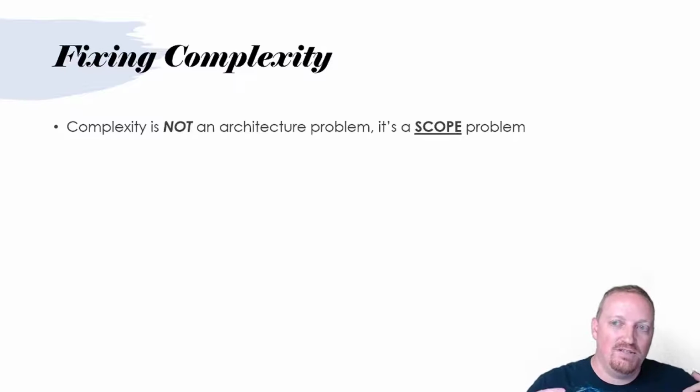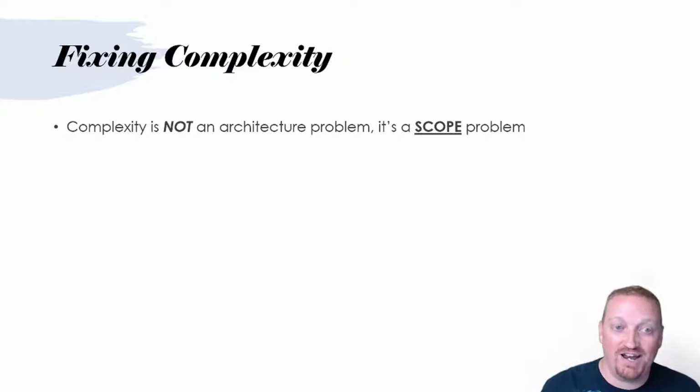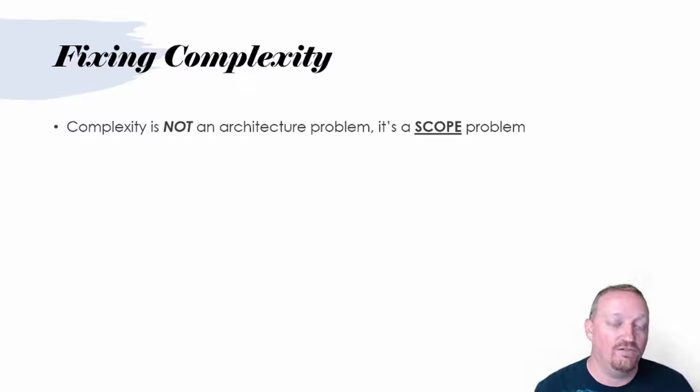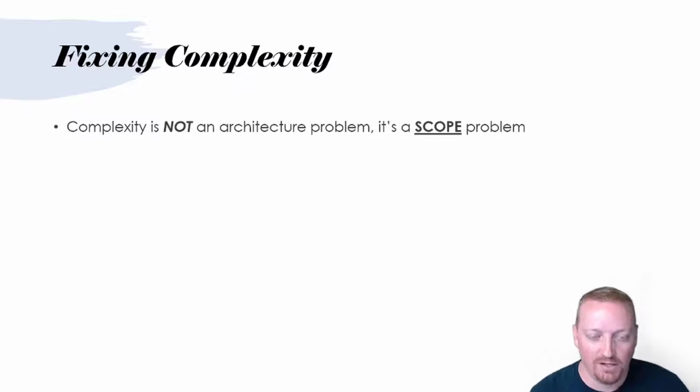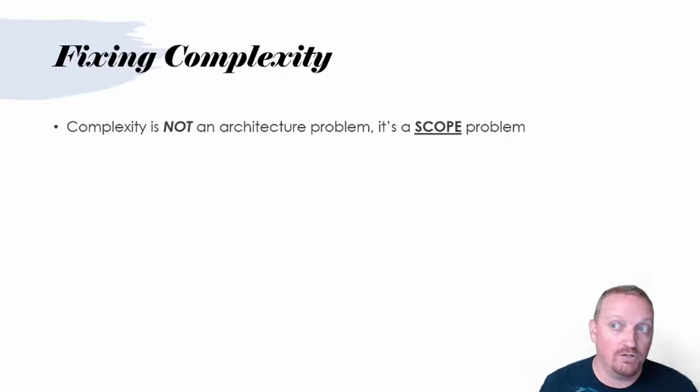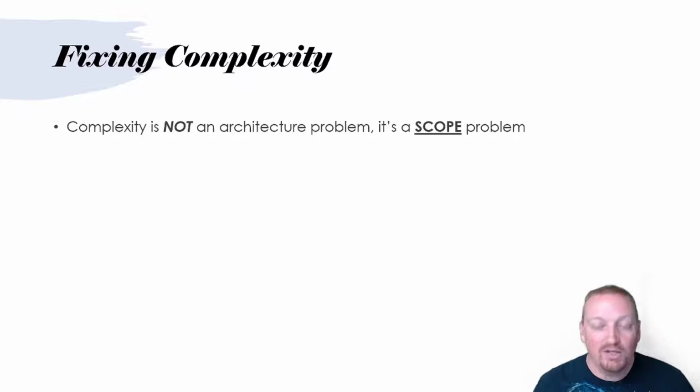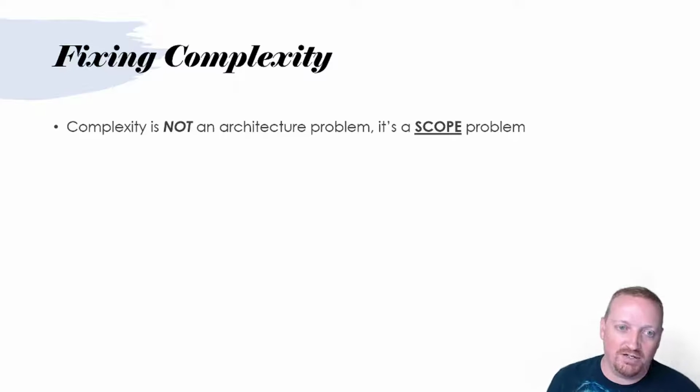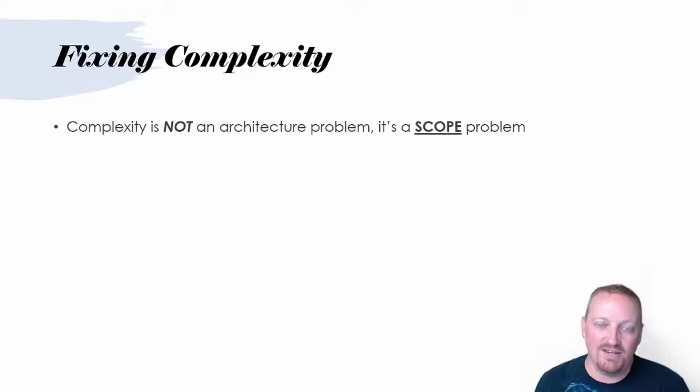What are maybe all the different pieces of architecture that I need to go talk to? That's certainly a thing, right? I really like the rule of 3 for a lot of things. I'm kind of obsessed about the rule of 3, that if I have to write code or talk to 3 different layers of architecture, then that automatically means it's a complex problem. But that doesn't necessarily always hold true. It's just a good general rule of thumb for me. You guys are welcome to take that. But typically, if you're talking to a lot of pieces of architecture in order to accomplish the goal, then yes, that is probably the driving reason why it is a complex problem you're trying to solve.